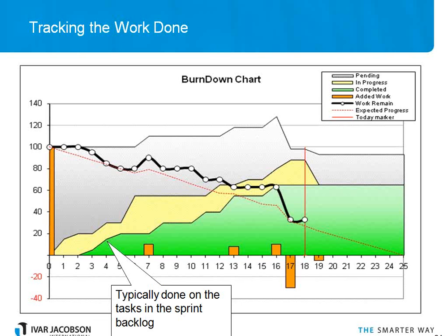And how much is left to do. So here we've got to the end of day 18, and you can see that we have completed just over 60 of our 100 days of task. We have most of what's remaining in progress. The scope is the amount of work we've got rid of, the stuff we didn't think we could do by the end of the iteration, so it looks like we'd have a nice flight path.